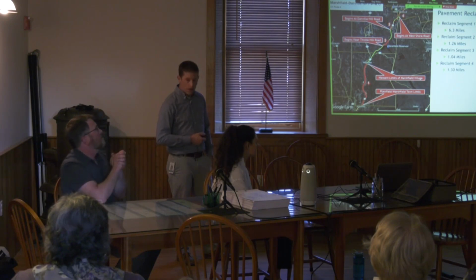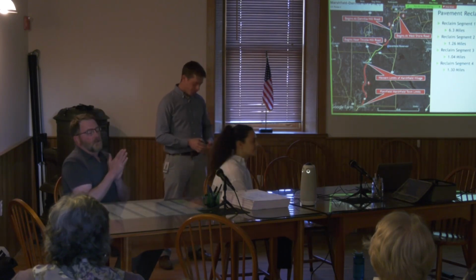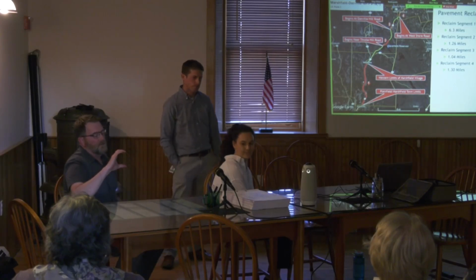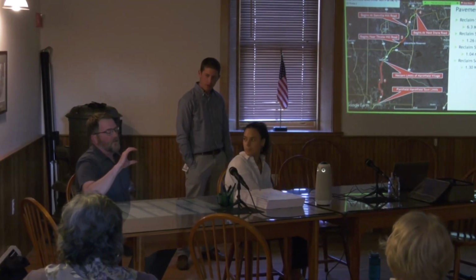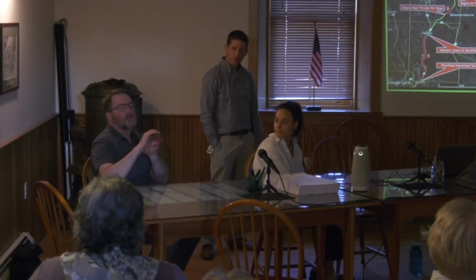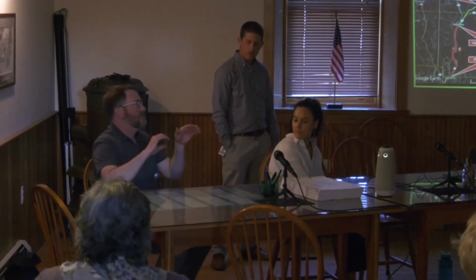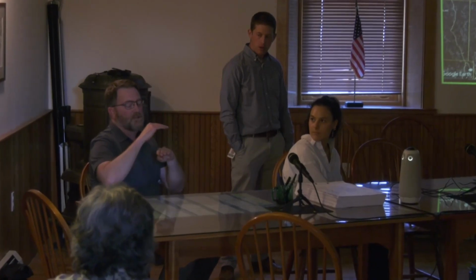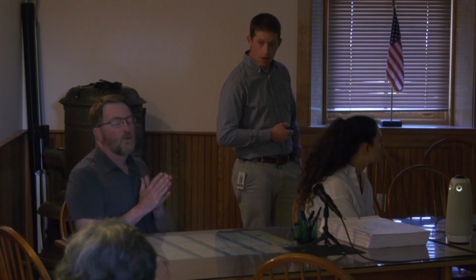We're not going to reclaim that twice. What we're going to do is remove 4 inches of pavement, and there was a lot of concern about the elevation of the roadway relative to a lot of the camp driveways. So design has actually lowered the road elevation through there. After we take the pavement off, we're going to excavate a foot of the existing road bed and replace it with a foot of gravel. Then we're going to stabilize it with the emulsion, and then we'll pave over it. So don't hold me to it if you live on the road, but generally that 4,000 foot stretch along the pond where the camp accesses are, the road will be 2 to 3 inches lower than it is now.